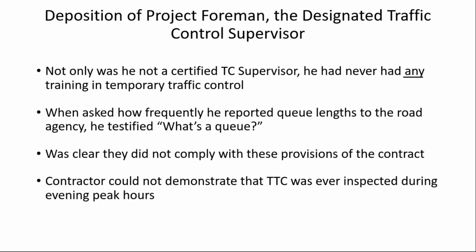The project foreman for the contractor, the designated traffic control supervisor, was deposed. And he admitted he was not a certified traffic control supervisor, and sadly admitted he'd never had any training in temporary traffic control, if you can believe that. He was also asked how frequently he reported the queue lengths to the road agency.